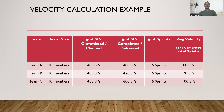For a regular scrum team, in the seventh sprint this velocity will be used as a reference for the upcoming sprint planning. If it is a scrum team within an Agile Release Train in the SAFe implementation, this velocity will be considered for the second PI planning — sprints 1 through 6 of the second Program Increment will use each team's individual velocity for their PI planning.